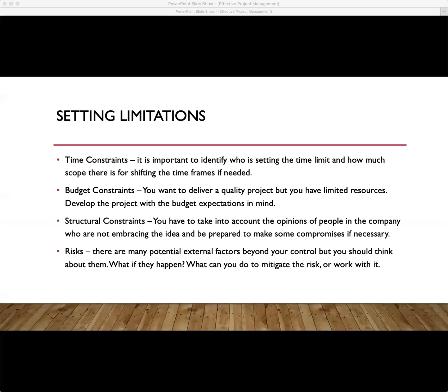I tend to be all over the risks and routinely develop a worst case scenario budget for the year so I know what could or couldn't happen if we were to lose, for instance, our major funder. Or what if we can't hold that special event? Where might I end up looking in that case for alternative revenue?